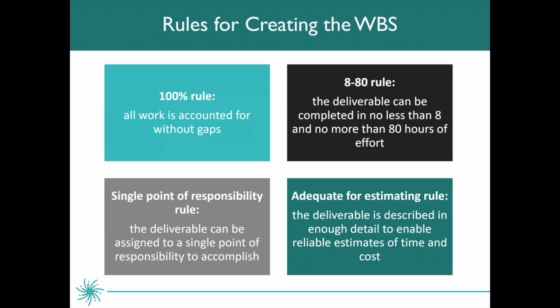The 8/80 rule is another good tip. The deliverable can be completed in no less than 8 hours and no more than 80 hours of effort. If you find yourself breaking the work down into quarter of an hour increments, you've probably gone too far. Really focus on that 8/80 rule.